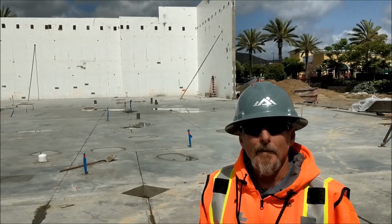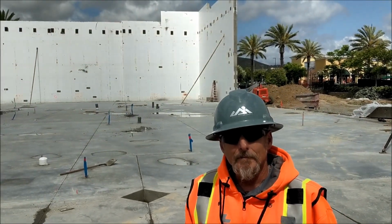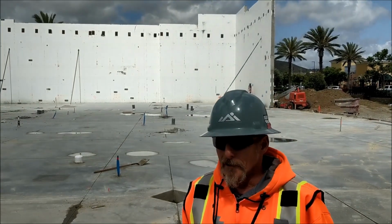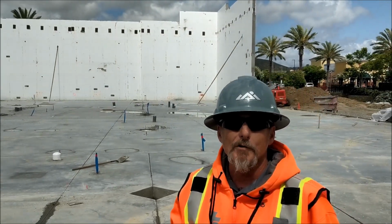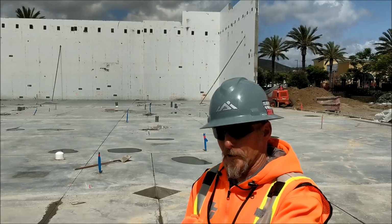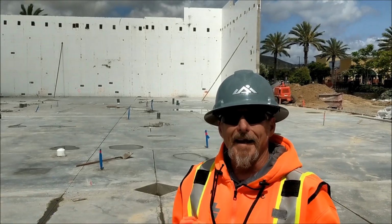Wow. So you've got 40-foot high walls here, 27 plus thousand square feet of wall? Yes, sir. And you had an installer come out here, put it up for you. How'd it go? It went really good. We had scheduled approximately 3 weeks more than what we thought the whole job would take as far as getting the walls up. So these walls flew up faster than we thought. We're used to pouring walls in 4-foot sections, and with the ICF walls, how they clip together, they were able to go up 10'8" at a time.